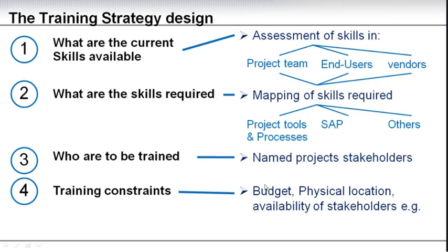In one of my recent projects, we had a large number of locations and a very small team in each location, so it was impossible to have everyone assembled for one week of training somewhere. It meant basically you need to shut down the location. So we designed ways where we could bring the training to them, and we had a backfill team that could go out while they were doing the training.